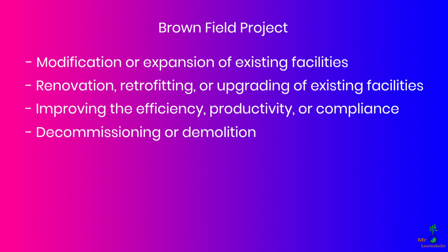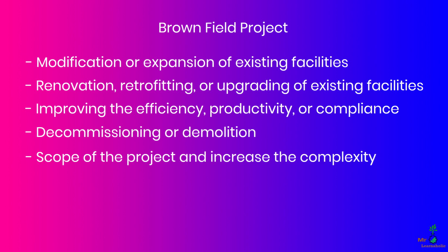Brownfield projects can be challenging as they often require work to be done while the facility is still in operation, which can limit the scope of the project and increase the complexity of the construction process. These projects also require a high level of coordination to ensure that the existing operations of the facility are not disrupted. Additionally, brownfield projects may also be subject to regulations related to the cleanup of contaminated sites, which can add additional costs and time to the project.